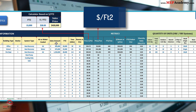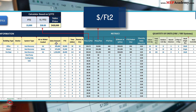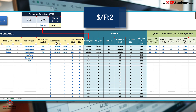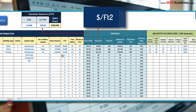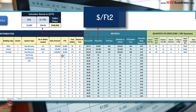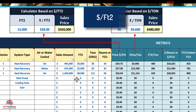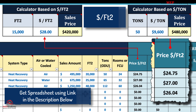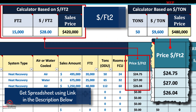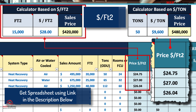Cost per square foot: quickly estimate the cost for projects of varying sizes, tailored to your specific building area. Another metric used is cost per square feet of conditioned space.